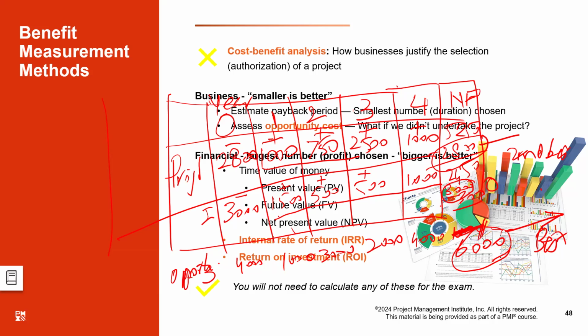Your total profit is 2,450, and it is to be earned in 4 years, right? So I have to divide it by 4. So if I divide 2450 by 4, it comes out to be 612.5. So this is my yearly profit.